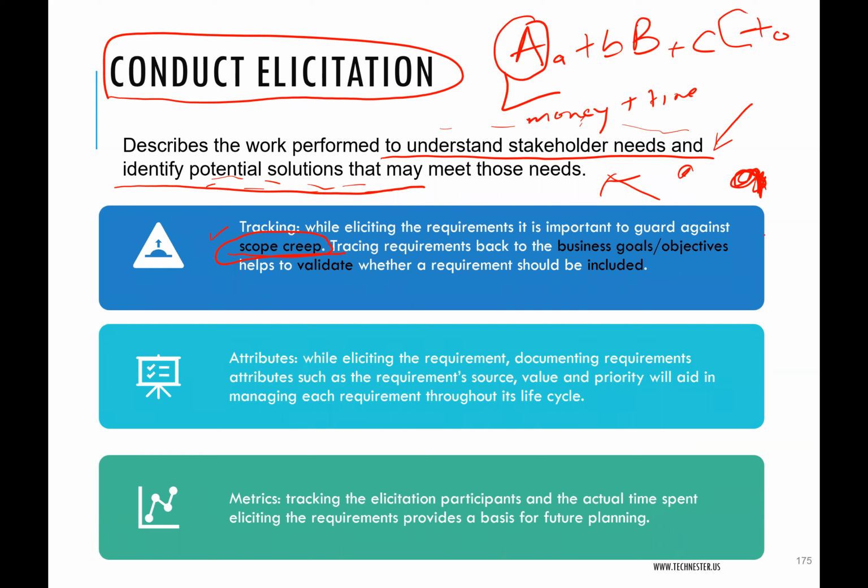That's what the stakeholder wants, small letter A. But the developer now wants to spend time on this feature and do it to the point where it becomes capital letter A, adds all the extras, fancy things that the stakeholder does not want. They are fine, they are nice, but they are not the requirement. They are just extra. That's gold plating. It's a form of scope creep.